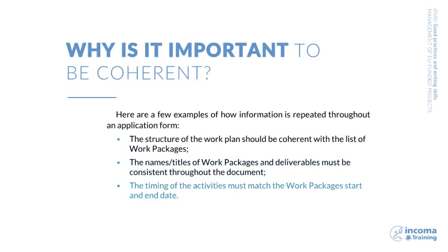Finally, the timing of activities needs to fall within the scope of the work package. If your work package ends in month 10, the deliverable from the same work package should not be planned for month 12. Coherence is key. A high quality proposal stands out for its coherence and accuracy.